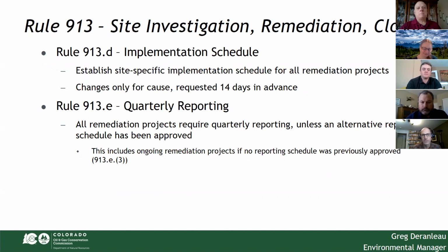So moving on to the site investigation, remediation, and closure, Rule 913. Each Form 27 will now establish a specific site-specific implementation schedule for the remediation projects. And changes are allowed to that schedule. Obviously, things change in the field and need to change, but only with cause, and